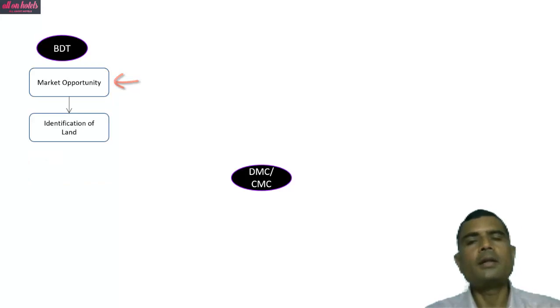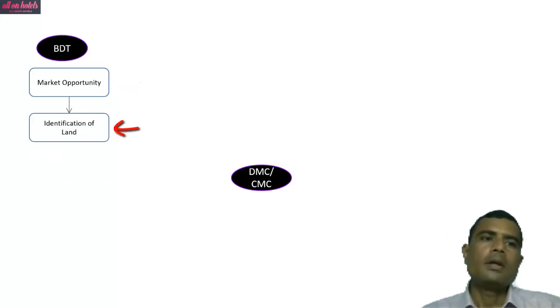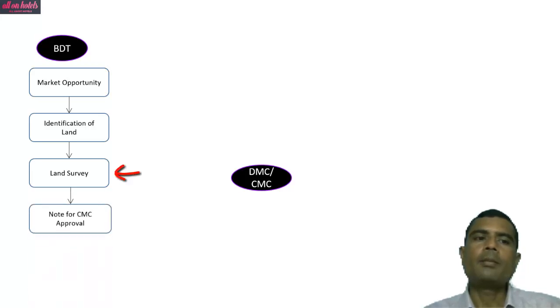So let us see BDT, business development team. They see the market opportunity. They study identification of land in that market. Then they do a land survey through an external agency. They put up a note for CMC approval.